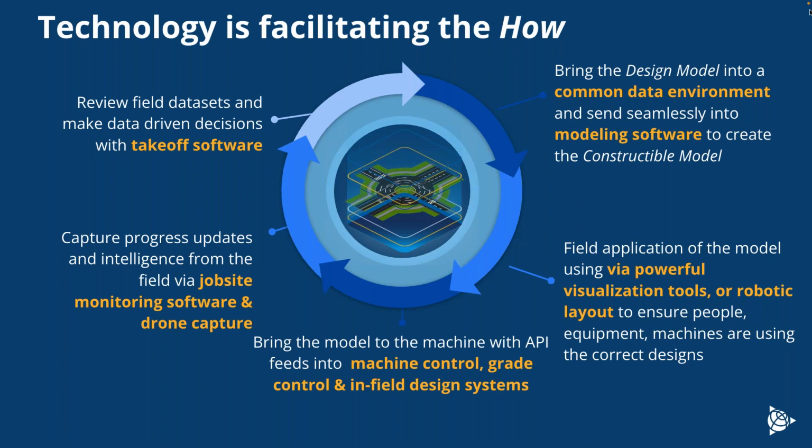If we need to go reconstruct things, if we need to have things done on site, it's a far greater expense than if we could do that back in the office prior to the construction phase. A simple example is utility relocation; being able to do that prior to construction saves a significant amount of time. But of course, you can only really do that if you've got access to that data and are able to share it between the contractor and the utility designer, to ensure that those conflicts are minimized prior to construction.